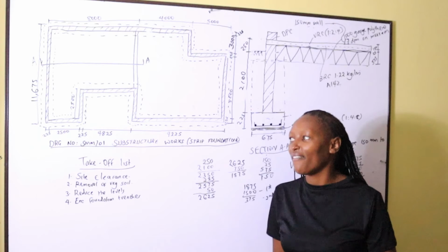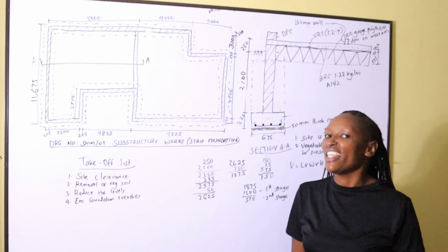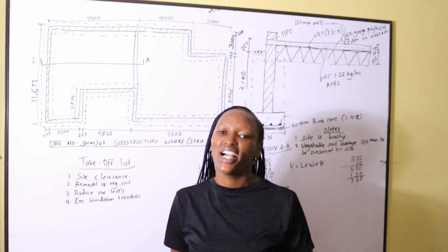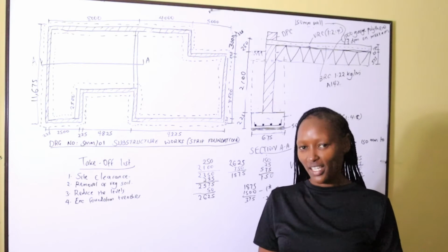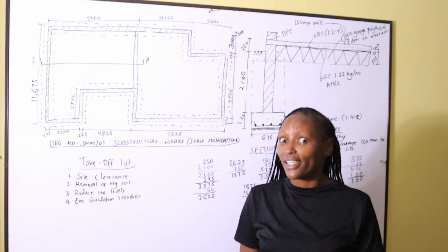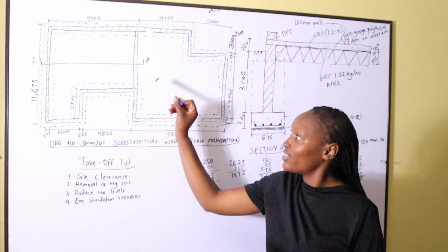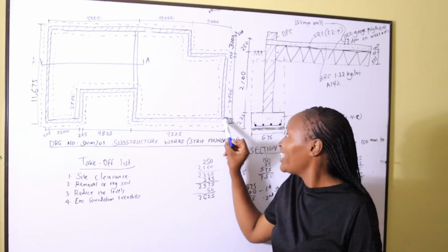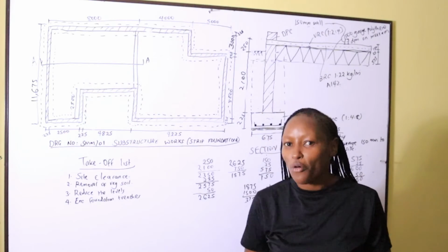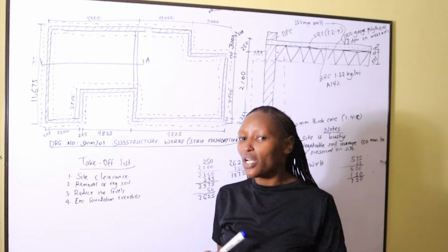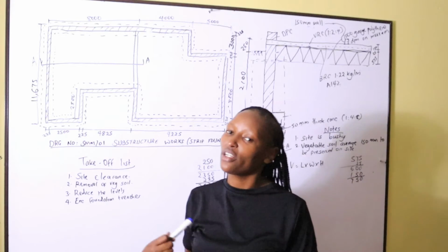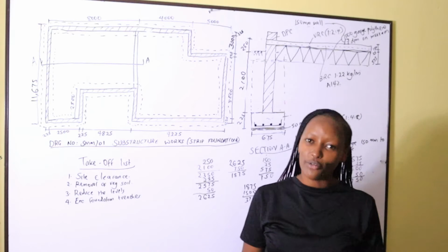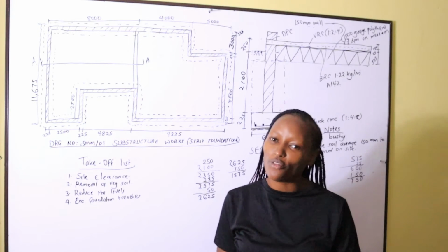For example, this is in excavating the trenches. So we have said the center line of the trench is equal to the external perimeter of the trench. We deduct number of corners times the thickness of the trench. We could sometimes be having internal corners like these ones and external corners like these ones. So how do we calculate number of corners? Number of corners is equal to external corners minus number of internal corners. Let me say that again. Number of corners, we get it by taking number of external corners minus number of internal corners.